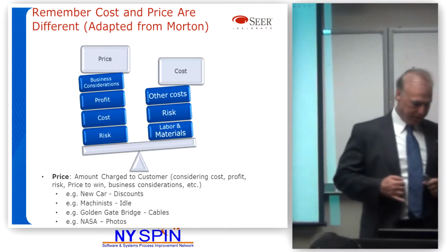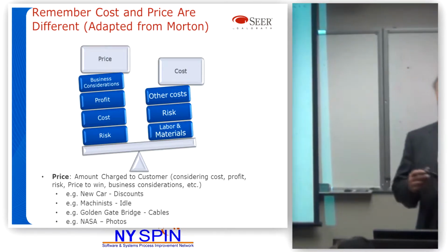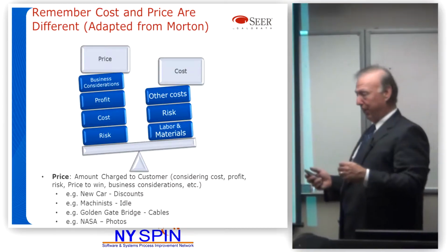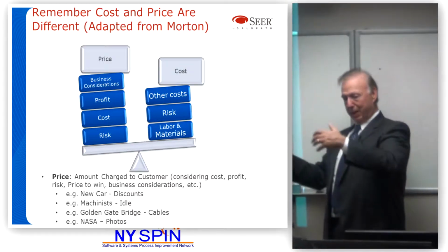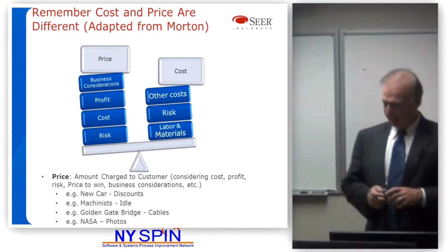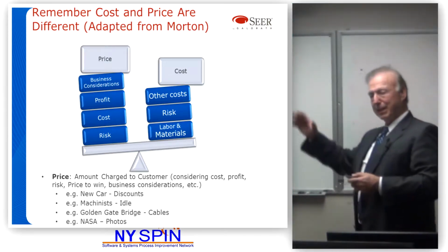When you're doing an estimate, especially if you're a vendor, if you're in-house, maybe cost and price are the same thing. If you're a vendor, you might lower your price because you want that new customer. You might increase your price because you know it's sole source. Of course, none of you would do that. There are lots of reasons to come up with cost versus price.